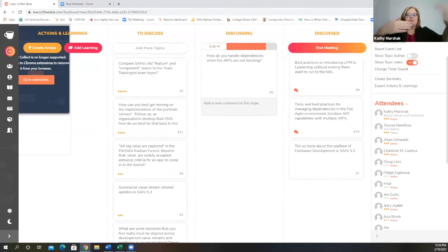Because now you have to, for example, I'm going to start with PI planning. When you build your program board, if you have dependencies with trains that are not on your cadence, you just need to keep their dates in mind on your board as you map out those dependencies. That's what you could do at PI planning, and then carry that forward as you execute the PI.